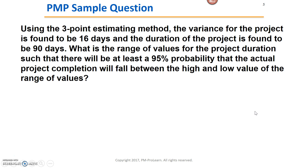Now let's apply this back to the sample question. They gave us the variance for the project as 16 days. I know variance is not a number I can use directly to come up with a range — I need the standard deviation. So the first thing I do is take the square root of 16 to get 4 days as my standard deviation. They've also already given me the duration of 90 days, so I don't need to calculate the weighted average myself. Since they asked for a 95% probability, I'll use two standard deviations added and subtracted from 90 days.